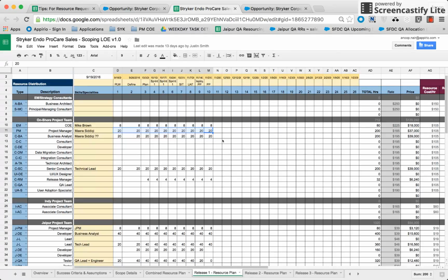The LOE is usually created in spreadsheets, and it has the complete view of the requirements for upcoming resources, based on their skill set, timelines, bill rates, and overall total billable hours, non-billable hours, or goodwill hours. So we can create resource requests with the help of the LOE.